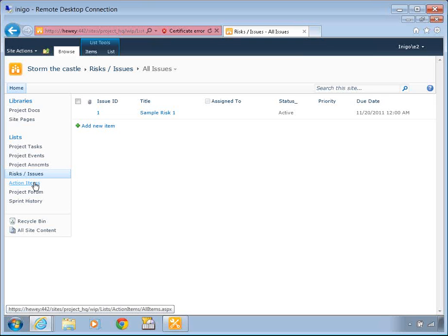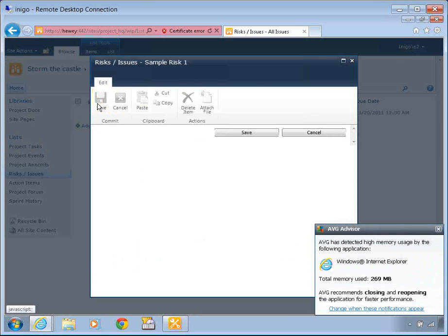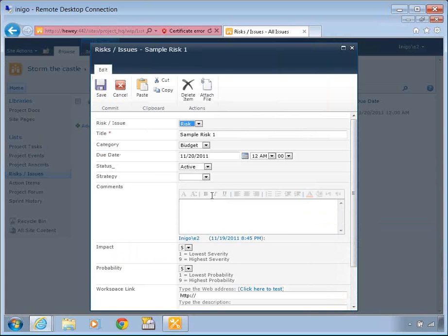So there is an out-of-the-box issues list that comes with SharePoint. And in the video series, we talk about some suggested other columns that you would put in here to manage both risks and issues together. That way, if it's just potential, it's something you're worried may happen in the future, it's a risk. And then if it actually happens, it becomes an issue, and you don't have to re-enter everything. You can just change the type of item in the list. For instance, we have a sample risk here. And if that actually occurs, I can convert this to be an issue.